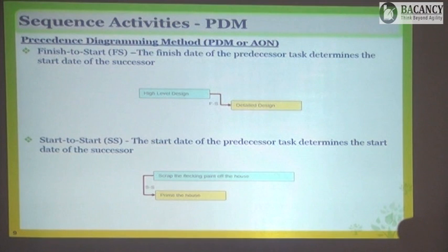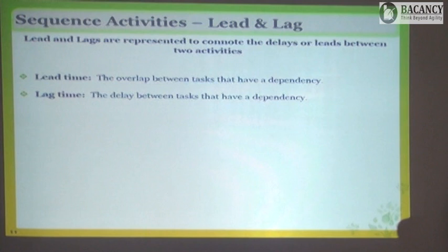Then we have something called lead and lag time, and I told you about the lag time already. So we were talking about in what relationship we can have this. The lag time can be there in your finish to start, start to start, and finish to finish also. This is our predecessor, this is our successor. And there is a lag time, let's say for plaster or delivery, of 3 days. So how we are going to write it is as